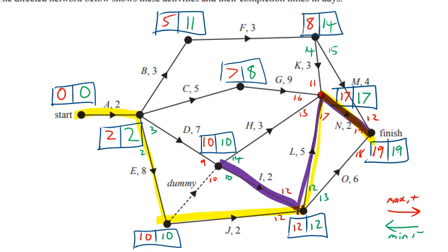Are we okay with that? And A, it's got to be in. A's got to be in there every time. And so where else can we go? Now this is where a lot of people made a mistake. It's using the dummy. That's the only change. Why can't we use D? And that's because of this little hidden 3 here.